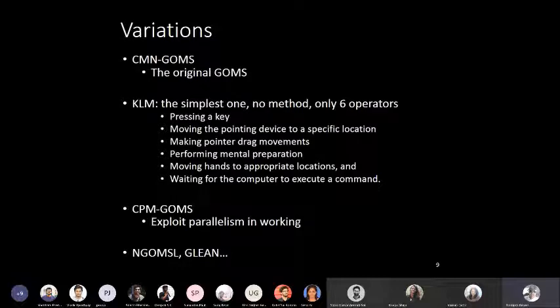So then Bonnie John at Carnegie Mellon took help from the traditional scheduling chart or the CPM analysis. CPM stands for critical path method. When we do project planning, we define several tasks and some dependencies among the tasks, and we find out the total plan execution time by calculating a critical path. That means the critical set of operations that has to be completed, based on the dependencies among tasks.